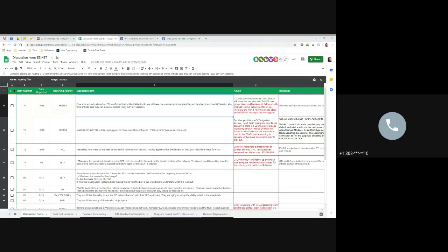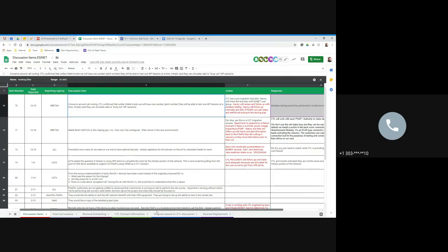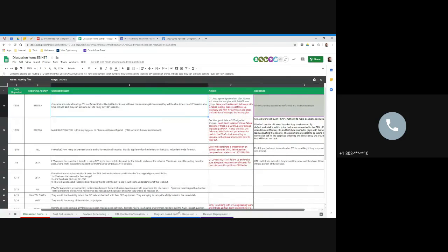And to follow up on that, the wireless path really is not changing because of the way the migration happens. We are grabbing everything at the selective router level and repointing them to the new ESInet network there. So the wireless calls still come into where they've always come into, using the path they've always taken into that legacy selective router.